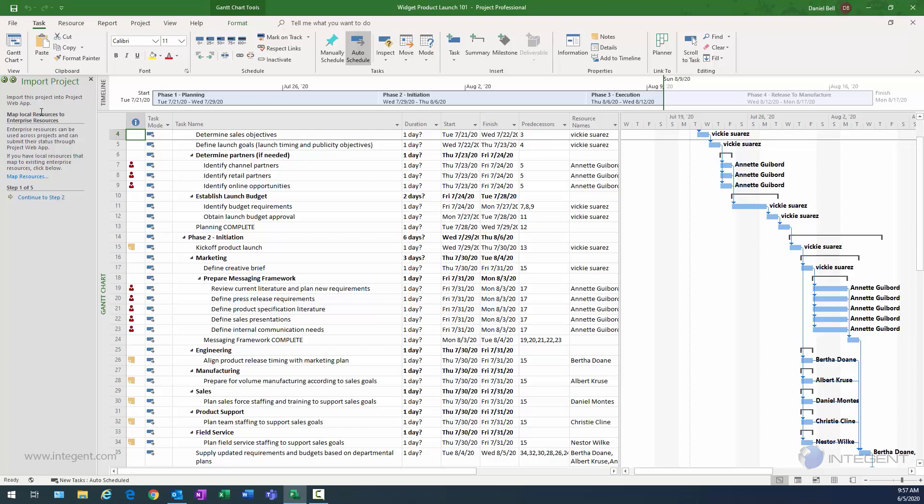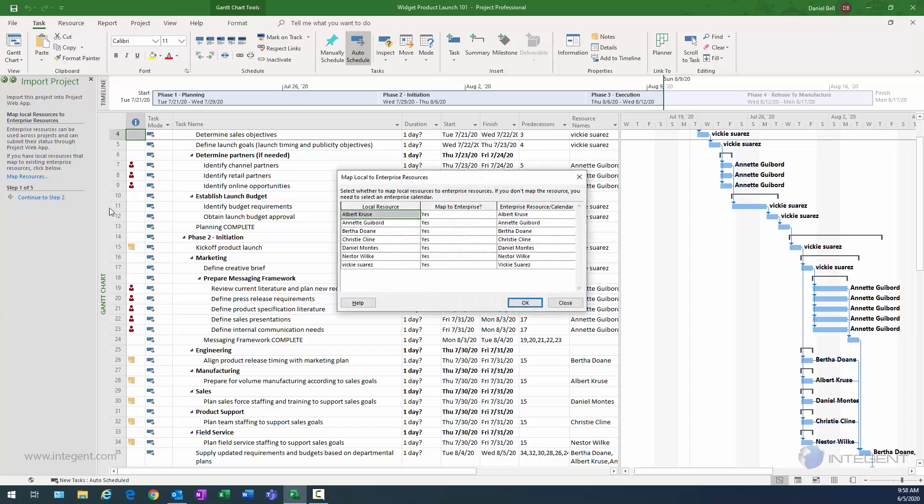The first step is to map my local resources to enterprise resources. So ideally, I'm going to name my resources in a perfect world. My resources, if they're named the same on the local project plan as they are in the enterprise, this map resource process will actually automatically map the locals to the enterprise.